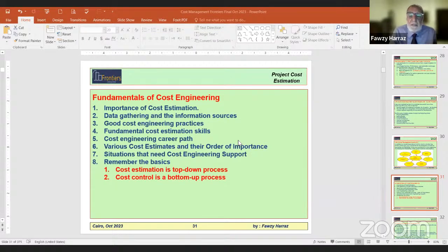One option is that some commodities critical to the schedule have been sea freighted. We consider air freight. There is a cost difference. But for all these options, you will add up the additional costs based on your proposal ideas and compare this to the delay penalty. So it may be that we have a good chance to avoid the delay penalty. The delay penalty, we all know, is not just money, it's reputation. The company, the contractor, and the owner as well suffer reputation damage when the project delays.